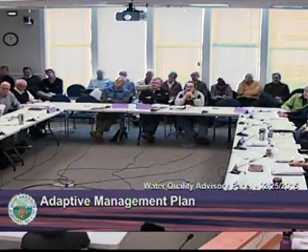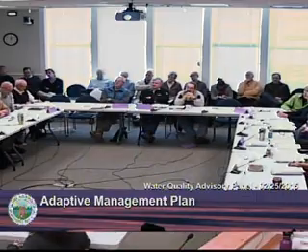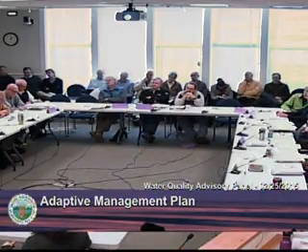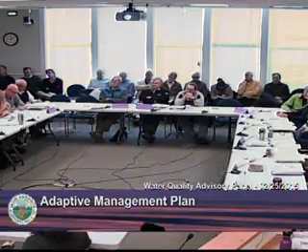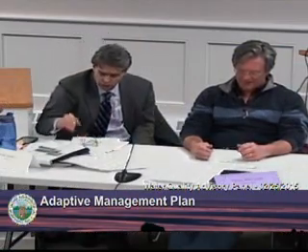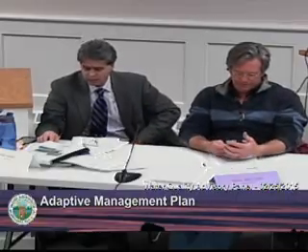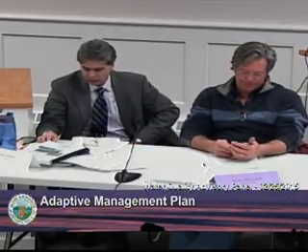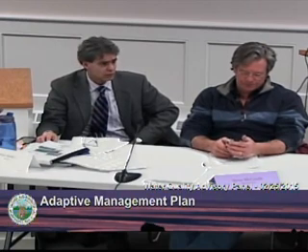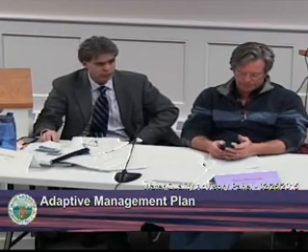And I think it's true that you're looking at an adaptive plan and you have decision points, and you can figure out how effective they are, if they meet half the expectations, if they meet 100% of the expectations, if they meet a quarter of the expectations. That's how you move forward in figuring out how you adjust the plan. But I think the backbone of that always has to be that there is a contingency. And the contingency is what the original CWMP was.